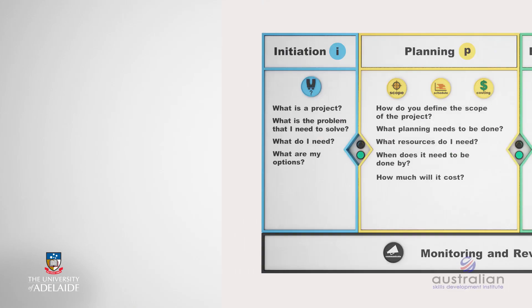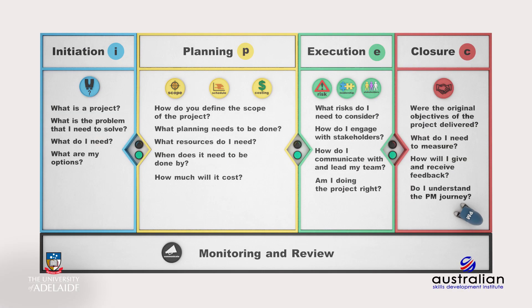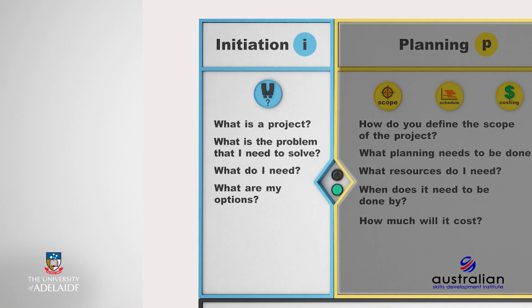In addition, project management follows a distinct linear process or journey, which is known as the project management lifecycle. The lifecycle has four phases. The lifecycle begins with initiation, which is the starting point of any project. It is usually the shortest phase, but the most important because it sets up the foundation of the project. It is in this phase that you flesh out the project objectives, success criteria, and high-level plan.